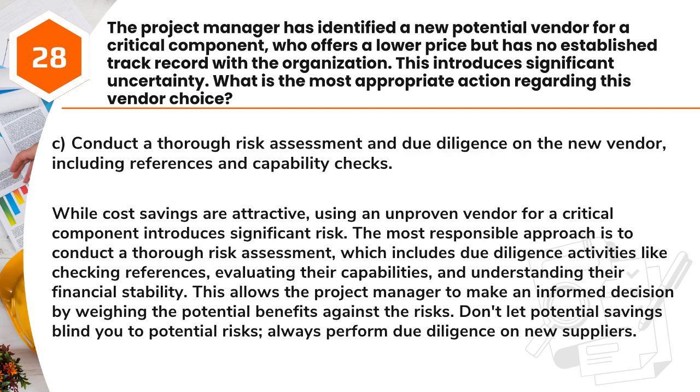Answer: C. Conduct a thorough risk assessment and due diligence on the new vendor, including references and capability checks. While cost savings are attractive, using an unproven vendor for a critical component introduces significant risk. The most responsible approach is to conduct a thorough risk assessment, which includes due diligence activities like checking references, evaluating their capabilities, and understanding their financial stability. This allows the project manager to make an informed decision by weighing the potential benefits against the risks. Don't let potential savings blind you to potential risks. Always perform due diligence on new suppliers.